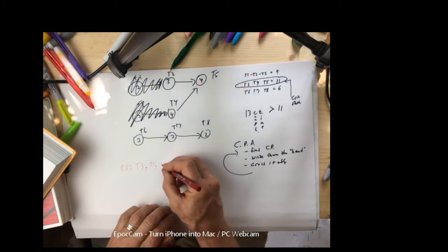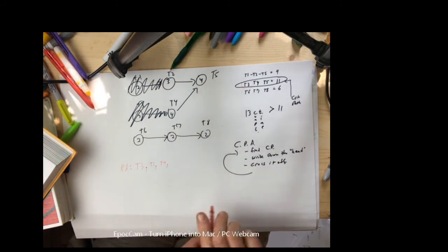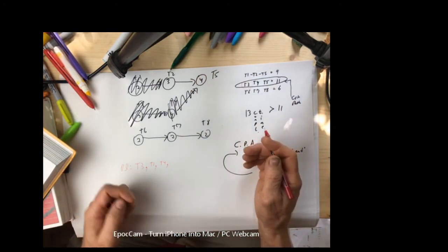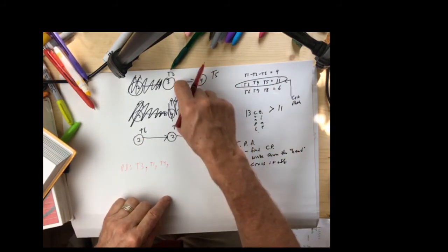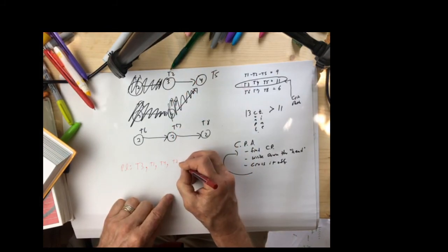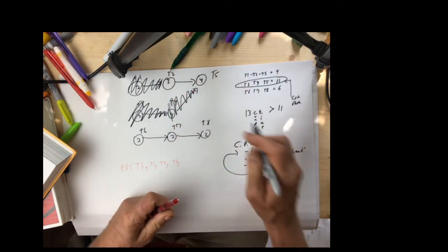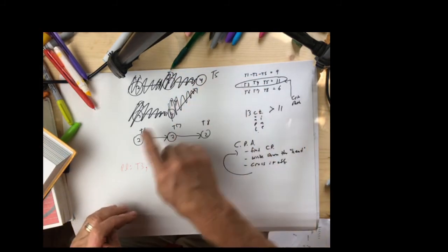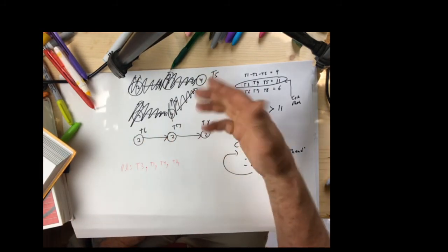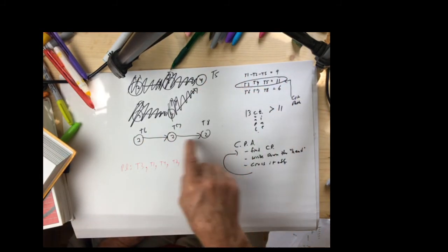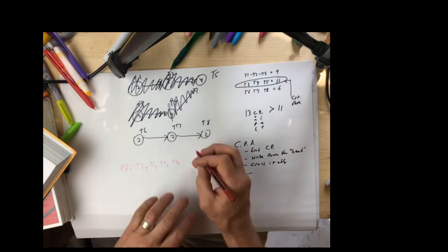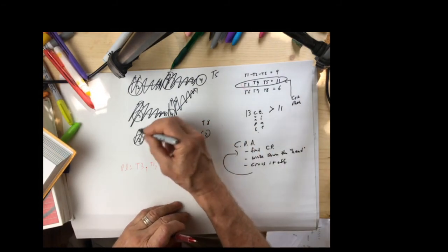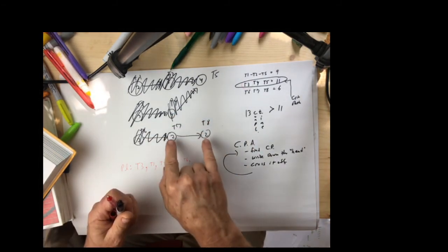So I'm going to write down T4. I'm going to cross it off. I'm going to repeat. 6, 7. T2 is the longest path. The head of the longest path. Cross it off. 6, 4. This is the longest path. That's a path. It's just a task all by itself, but that's a path. T6 is the head. I cross it off. And now I have 4 and 4.